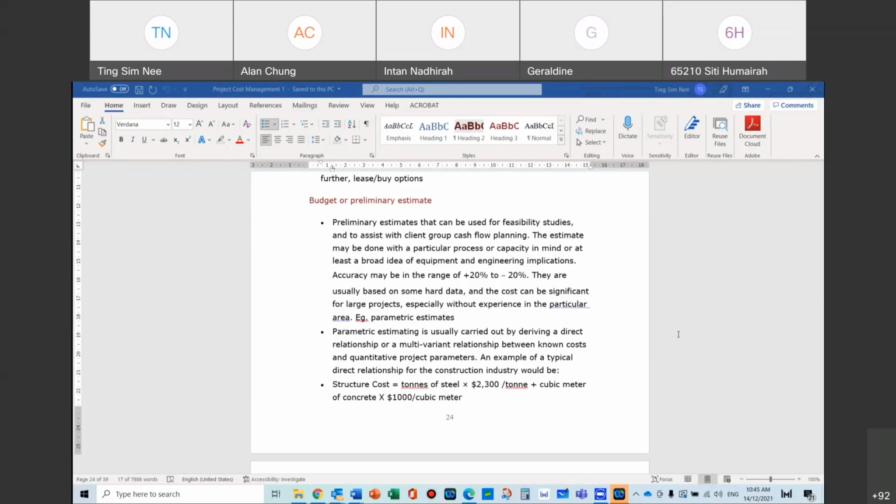And if you use waterworks, I've mentioned it many times in terms of waterworks costs. Waterworks, you could actually have a meter length times money, plus number of pillar hydrants or Swiss valves times per unit.